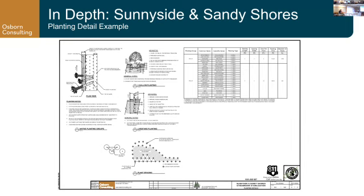And so we worked with the riparian specialists just to come up with a list of all of the native plants for this site and area. And then the contractor will have to pick, I think, 5 species out of each. So they don't have to use every single plant. They can if they want to, but sometimes it's hard to find in stock plants. So we just gave them an option to pick 5 and go from there with what's in stock.